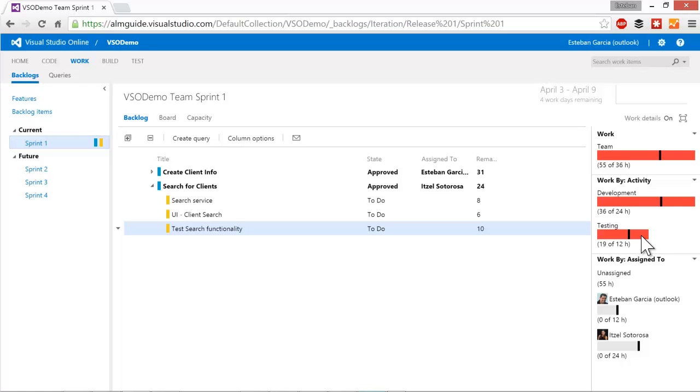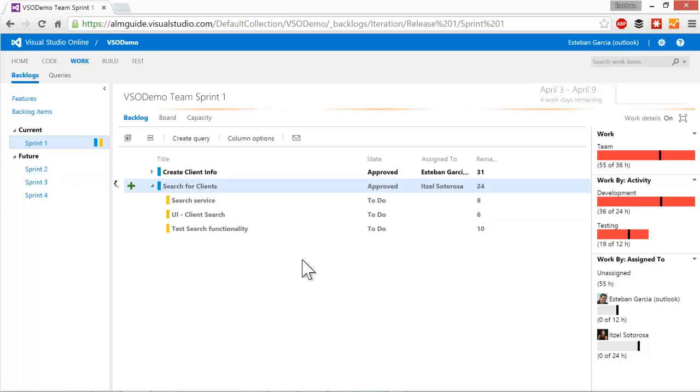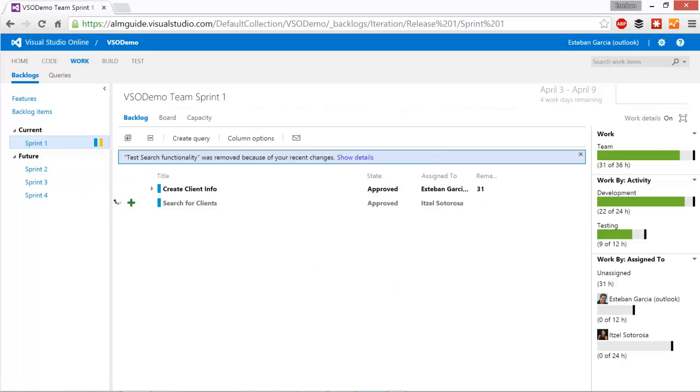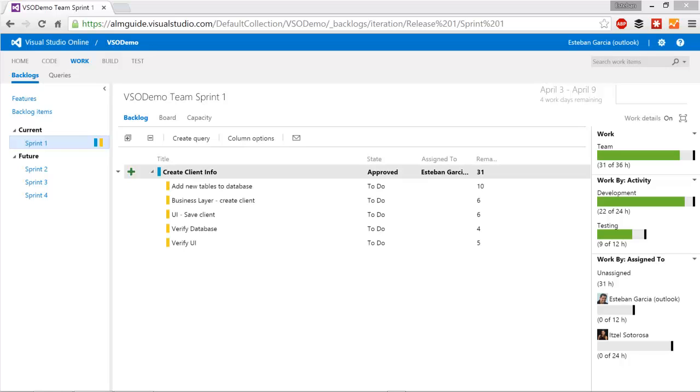In fact, we just committed our team to 55 hours when we only have 36 hours of availability. So what we can do here is I can take this story and drag it over to sprint two. So that means that we're going to take these stories and start working through them. So now your team is ready to start working through the sprint and show progress as they complete different tasks.